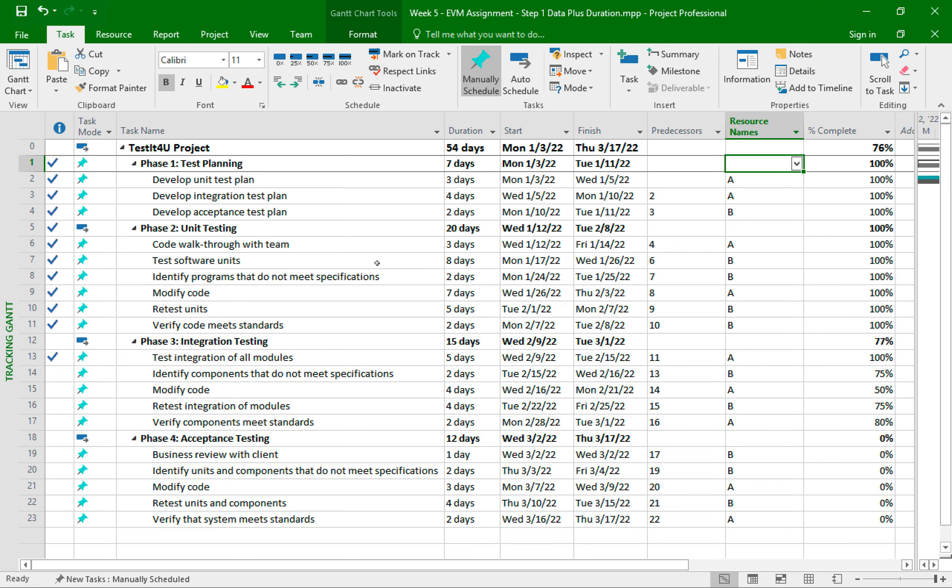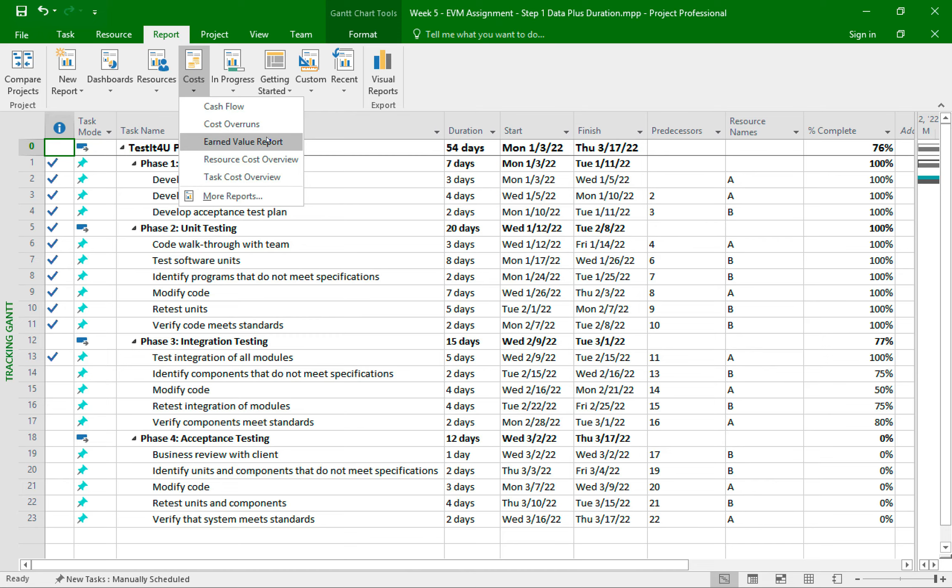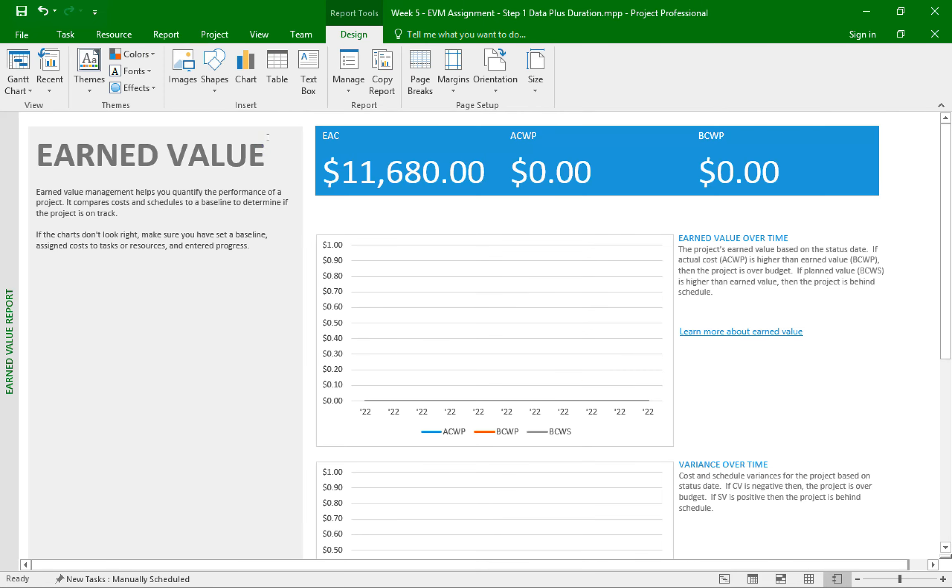Now with all this data entered, we are now off to step number three of the assignment. This part asks us to create an earned value report. And to do that, we simply click on the report tab, then click on the cost icon, and then earned value report. And boom, we get the report.